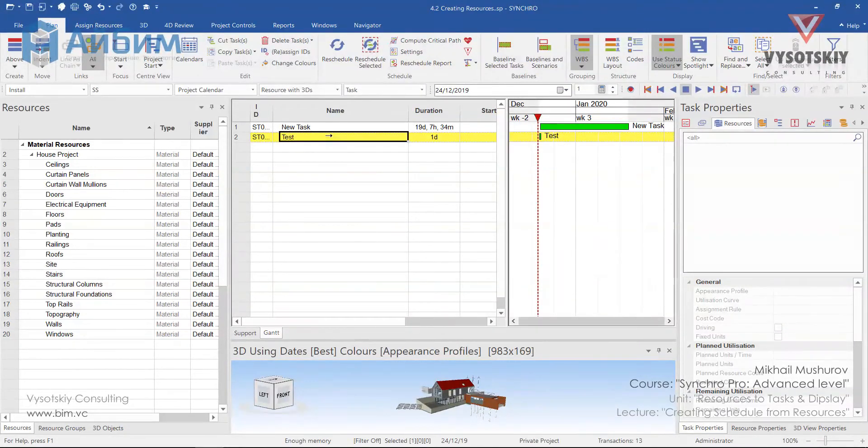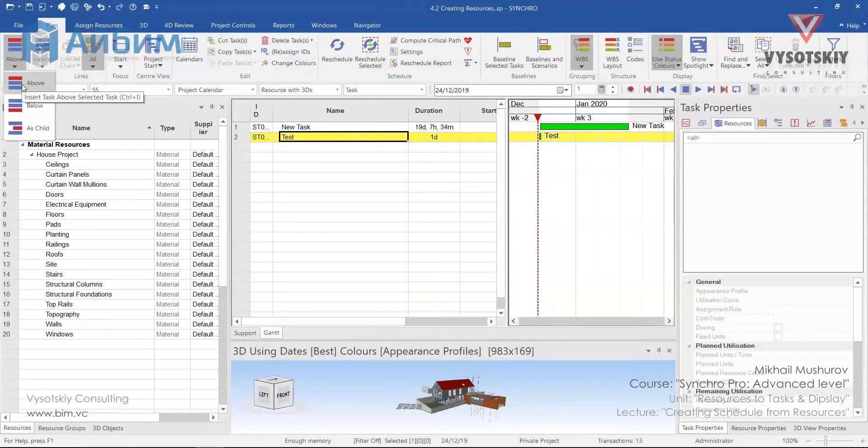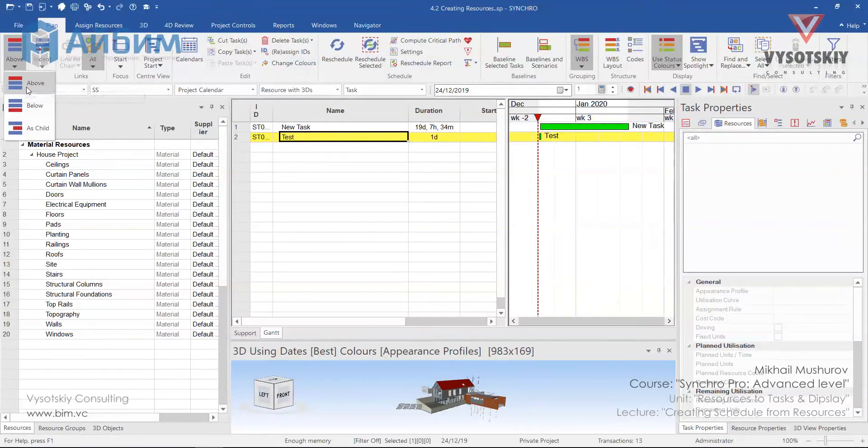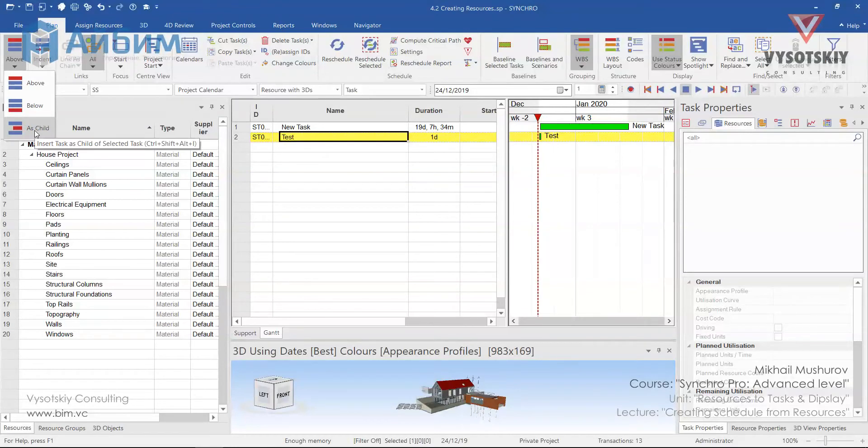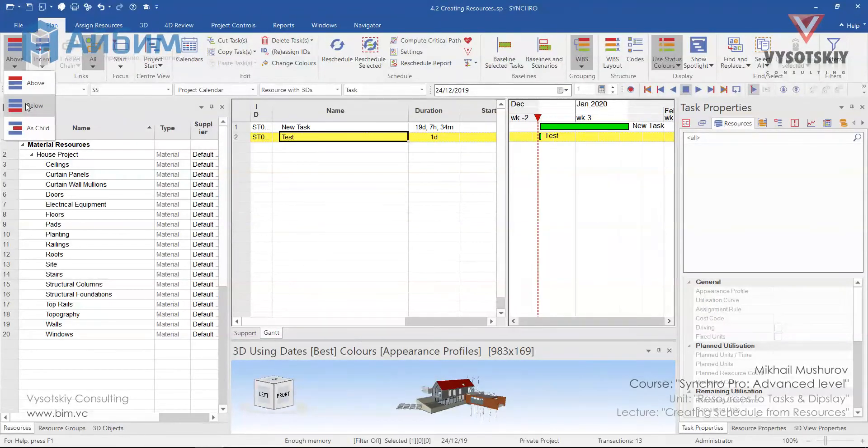Alternatively, we can select a task, go to the Create, choose the drop-down and select whether we would like to create a new task above, below or as a child of selected task. For example, let's create one below.